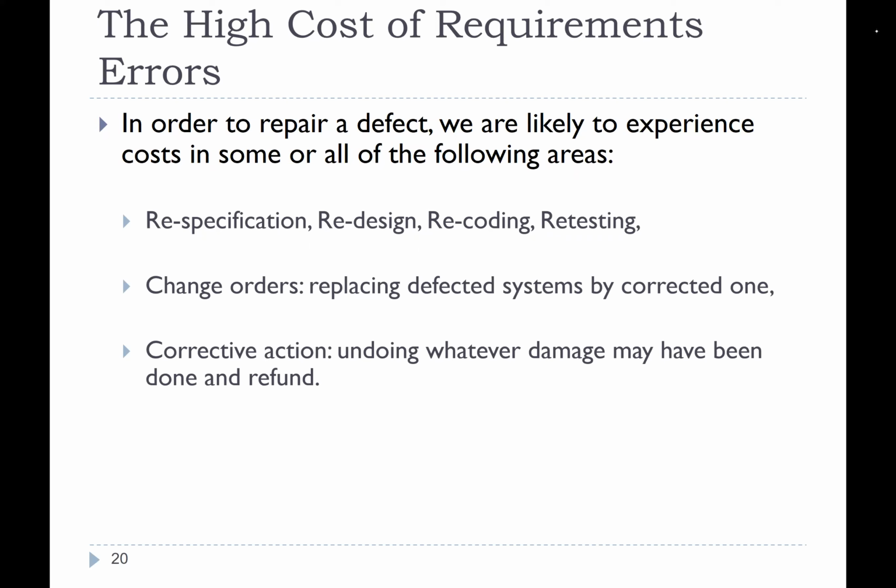All right. You submit a whole bunch of what we call change orders. This is a whole project management thing. It's a little like note cards. They used to be physical back in the day, but obviously now it's all software and automated. Then a team would look at it and do something called an impact analysis, because we already have a system, and now you're saying we've got to change something.